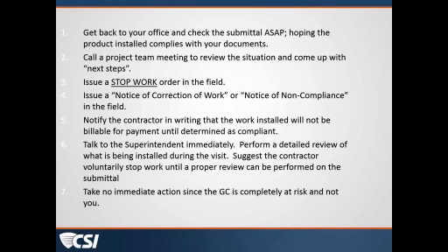Initially I was thinking numbers 1, 2, and potentially 6. Obviously, you bear the brunt of the responsibility for returning the submittals in a timely manner, and of course, your project manual, your contract should indicate a time frame in which you should do that.